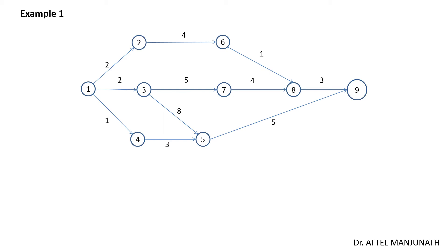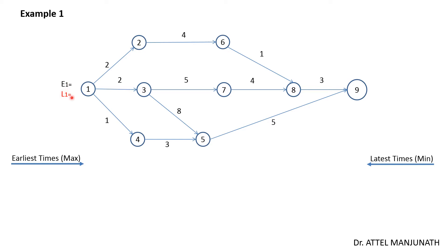The earliest times will be calculated in the forward pass computation — in this direction — and the latest times will be calculated in the backward pass computation — in this direction. For each node, you need to identify both the earliest time and the latest time. Similarly for every event, you calculate earliest as well as latest timings for all nodes given in the network.